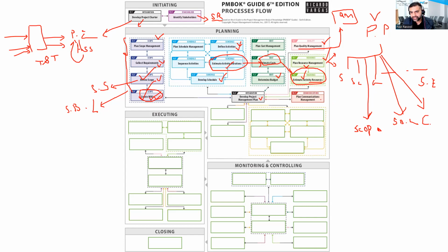Also, the communication management plan is a part of the project management plan, and then the risk management plan that talks about identifying the risks, their sources, their origins, then an analysis of those risks in a qualitative fashion, in a quantitative fashion, so that we can develop a risk response. We can plan a risk response. This risk response goes into our project management plan. And this risk response is basically saying if a risk comes, what will we do?